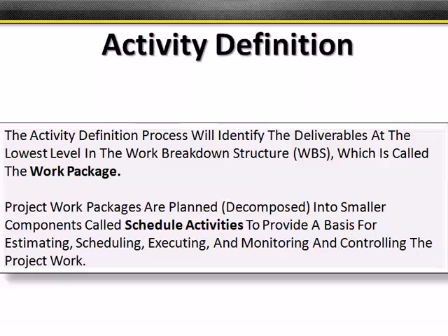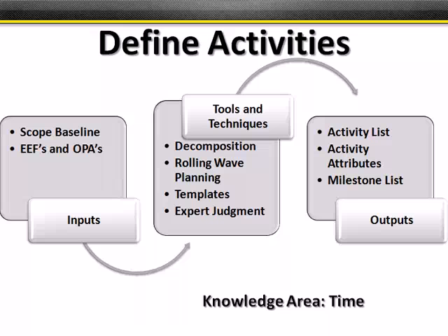Very first step is activity definition. Basically what we're going to do is take the work packages and then break them out into individual schedule activities. They will be decomposed into smaller activities. They use the term activity. Try not to use the word task. I mean, it's about the same thing. But according to them, schedule activities will allow you to estimate, schedule, execute, and monitor and control project work overall.